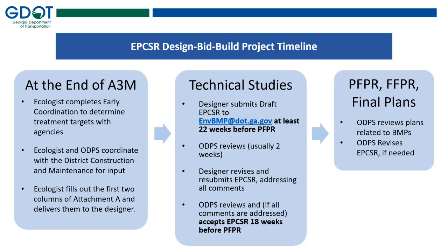The hope is that no changes will be needed to the report once completed, but design policy will use PFPR, FFPR, and final plan submittals as touch points to make sure there are no changes needed to the BMPs related to ecology resources throughout the project. Ecology is also able to flag any changes noticed at any time, and any changes will be captured within the EPCSR addendum. Next slide, please.